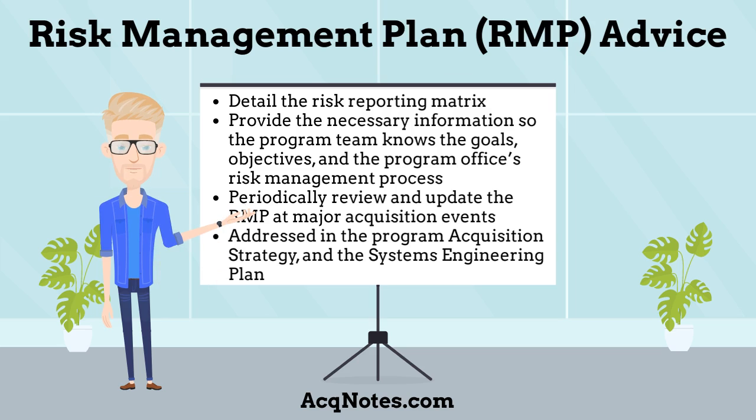The Program Management Office should periodically review and update the plan at major acquisition events. At the end of each acquisition phase, risk planning should be used in preparation for the next phase. And finally, the risk management plan is integral to overall program planning and should be addressed in the program acquisition strategy and the systems engineering plan.